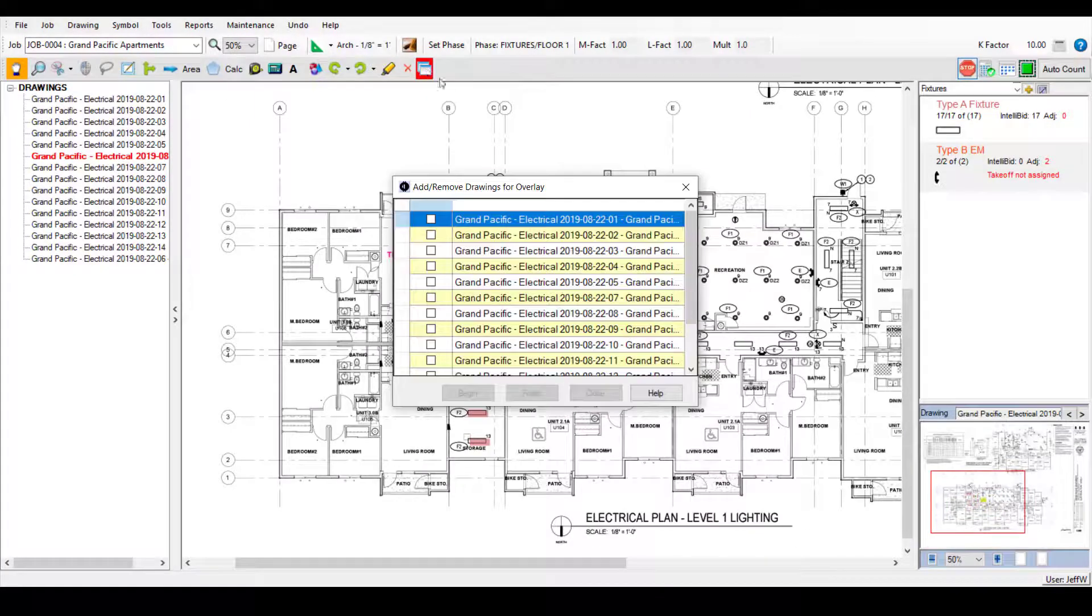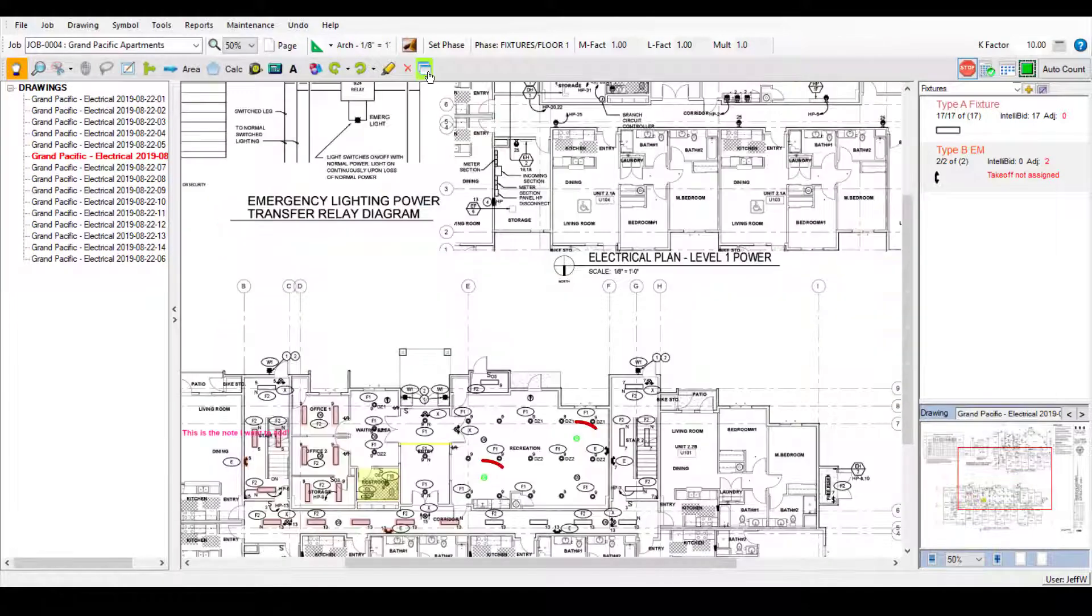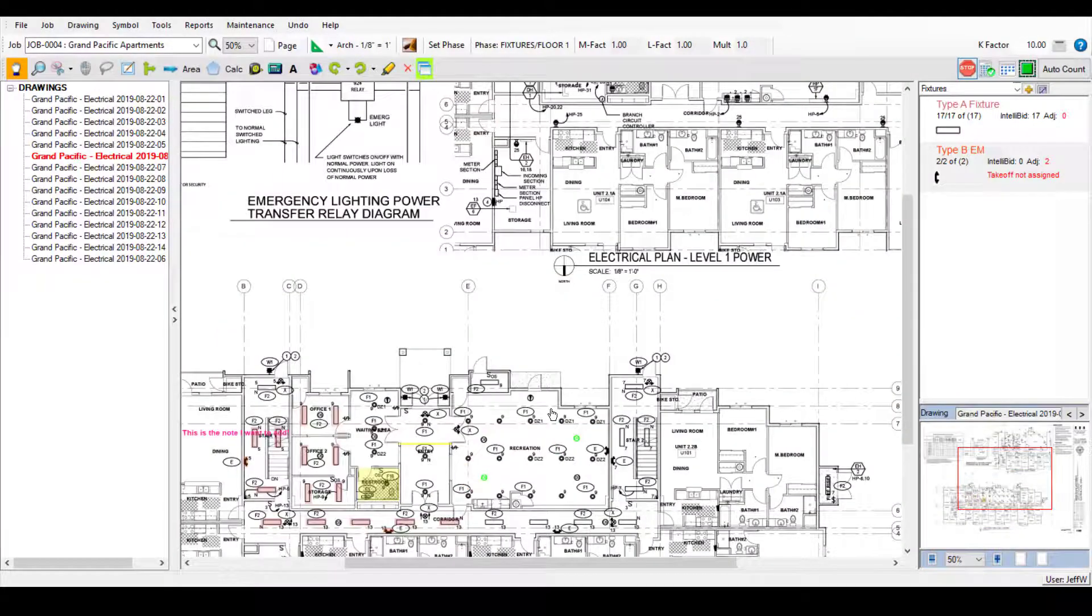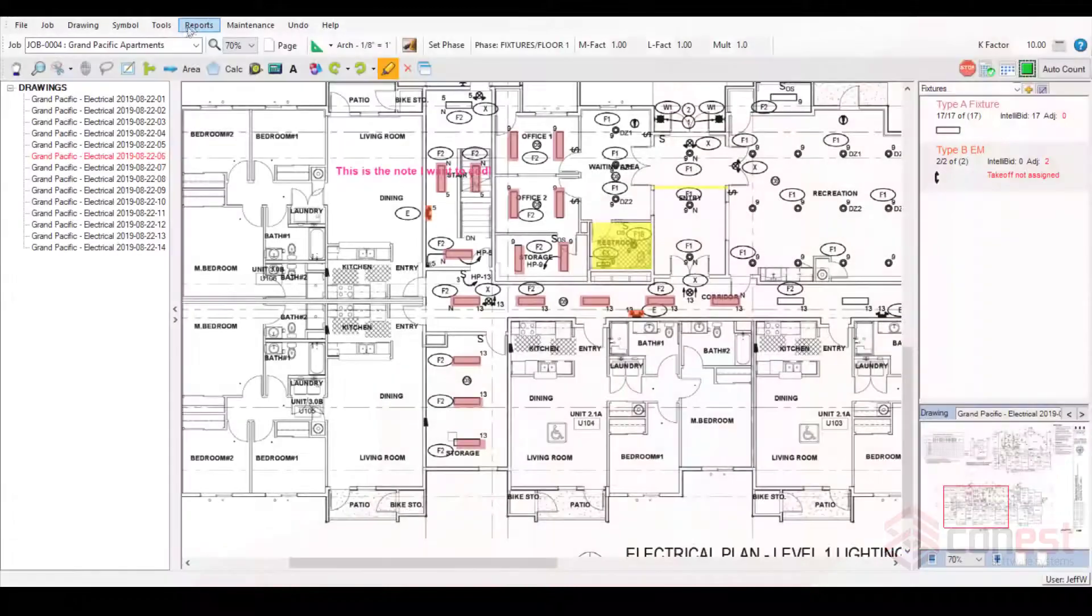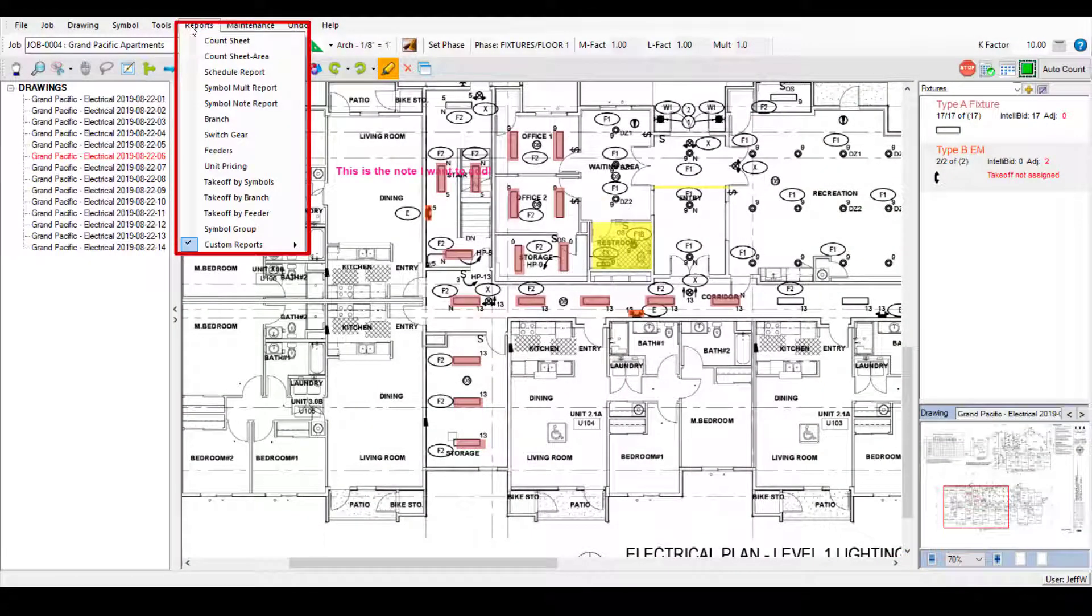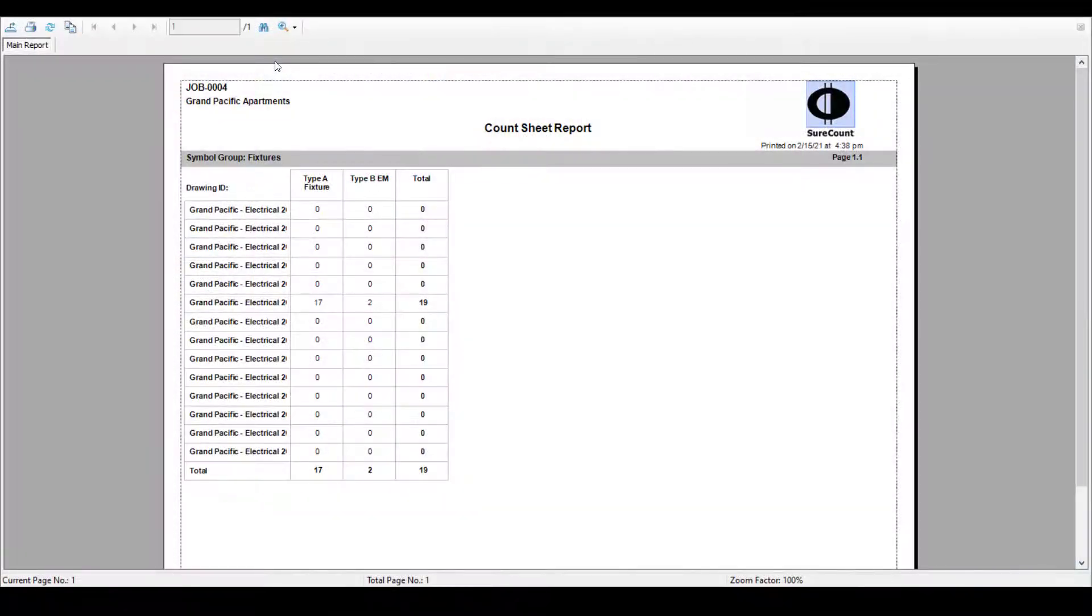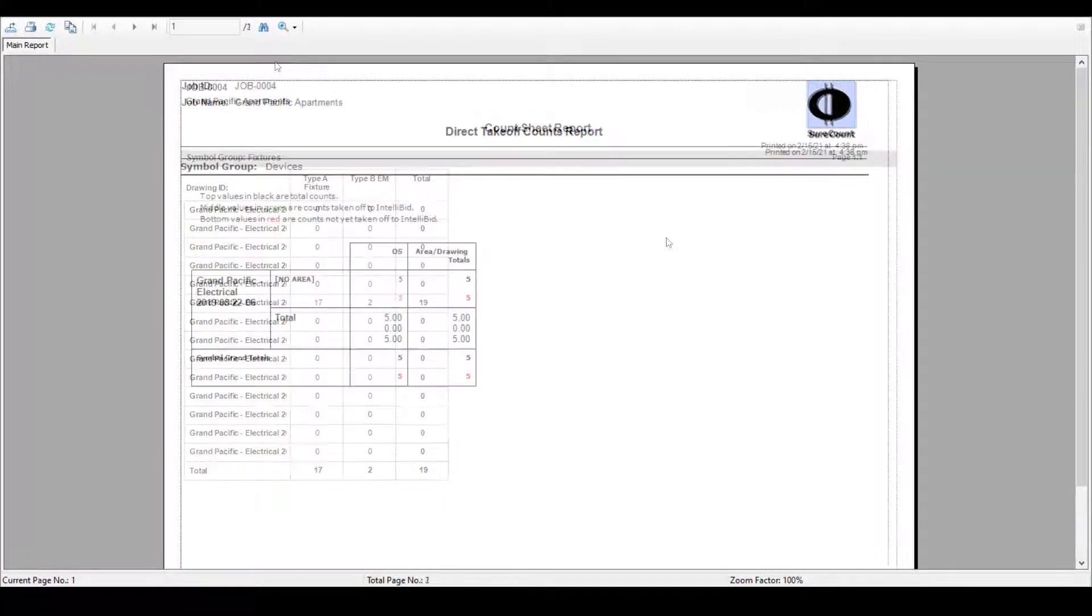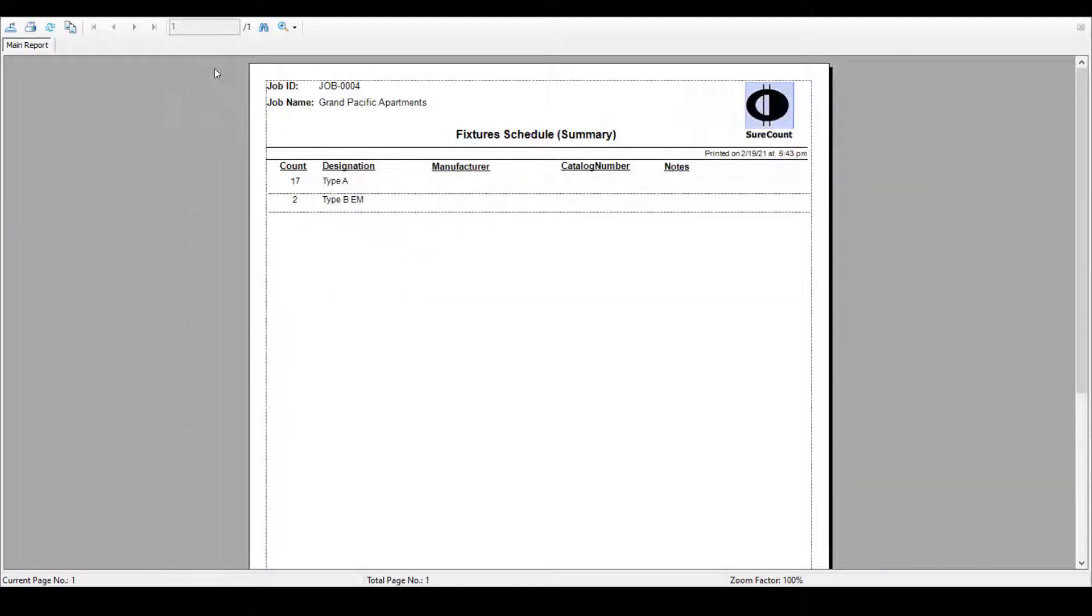SureCount's overlay feature lets you easily identify changes and revisions to your drawings. Once you've added your symbols and measurements, utilize SureCount's selection of reports including count sheets, takeoff by symbol, branch or feeder reports, and of course, the schedule report.